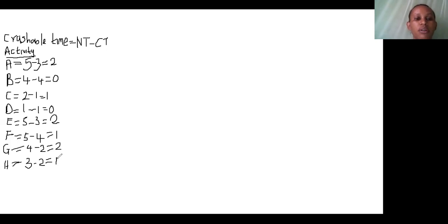It is the extra cost that will be incurred for every 1 week that you reduce the time for a particular activity. In this example, we are provided with the cost slope, called the extra cost per week, for every activity in the project.